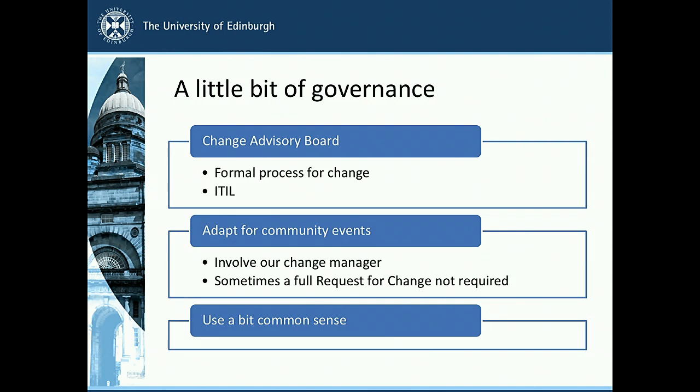We, as Bruce said, adapt our processes for community events. We don't go overboard on the change process for that. We get the change manager involved before the code sprint, so that they know which issues are being worked on, so that a full request for change usually isn't required. And probably another one of the very important ones, and I think this applies to all project management: use a little bit of common sense. You'll go a long way with it.